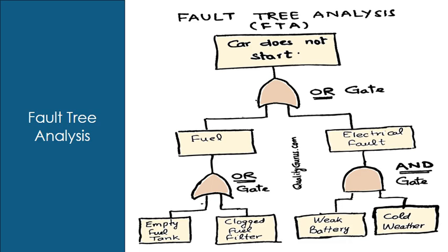Fault tree analysis is a top-down, deductive method used in safety and reliability engineering to map out all the pathways and lower-level component failures that can cause a major system-level unwanted event or accident to occur. Use when analyzing system reliability or mapping multiple failure paths with probabilistic rigor.